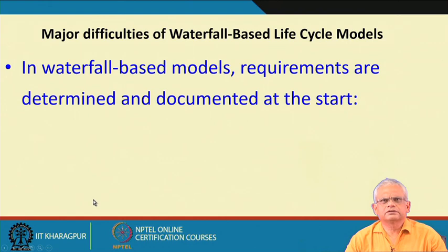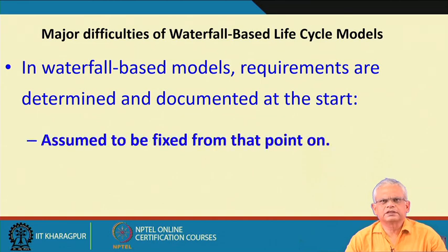Let us just elaborate a bit: in the waterfall model, requirements are determined and documented at the start, they are fixed from that point on, no changes are permitted, and long term plans are made based on this documented requirement.